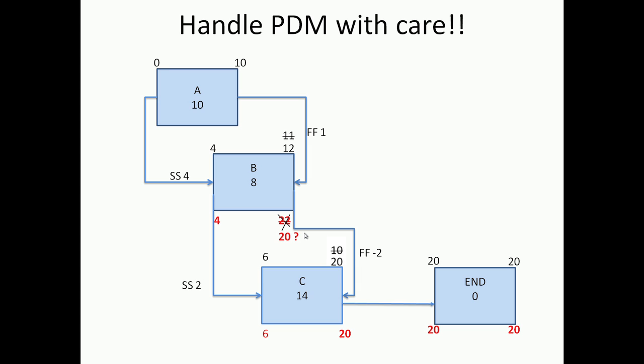One probably common sense way of saying is this should not exceed project duration. So I put 20 as the project duration, the maximum it can be the project duration, and continue down with the analysis. If I go back here 6 minus the 2 here goes to 4 and 4 minus 4 is 0, and I proceed this way. Now I am able to get an inconsistency here.